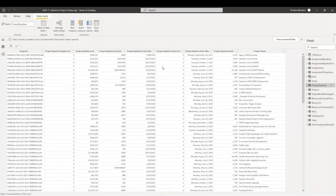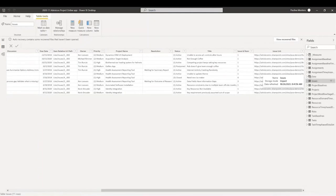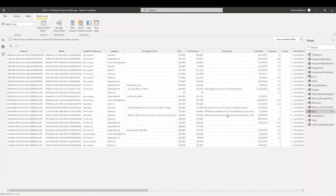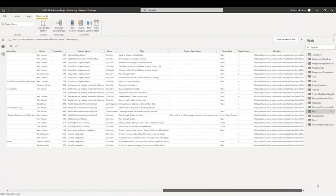We also have our project baselines. We share the baseline for our cost, for our duration, and for our finish date — this is helpful to compare the project actuals to what we thought we were going to have in the beginning when we first started planning the project. We also have our issues and risk list. This comes straight from our list in Projects and is a combination between our metadata and the columns in the actual list. So we would have assigned resource category, discussion, due date, owner, project, title, status, and resolution. Similarly, the risk list also is a combination between metadata and the columns in our list. In our risk list, we have assigned to category, cost, exposure, due date, owner, probability, status, trigger, trigger risk, and trigger description, as well as the title of the item.